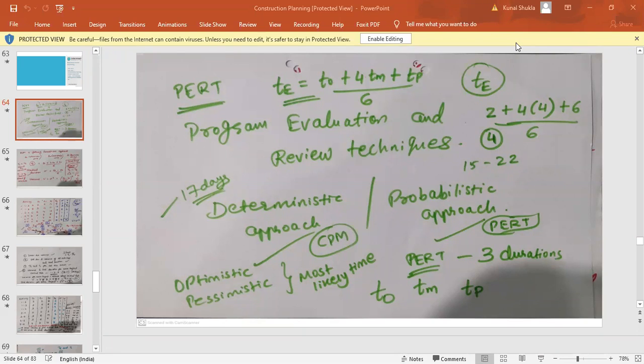So that means when I prepare a schedule for the second floor, at that time also I can write down 8 days only, right? Same way, suppose I am concreting the slab of the first floor. Suppose it is taking me 5 days and the quantity is x meter cube, then the second floor slab will also be x meter cube, and the days will be 4 days or 5 days, whatever.